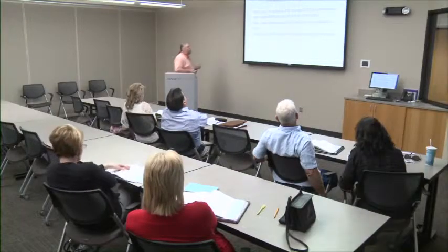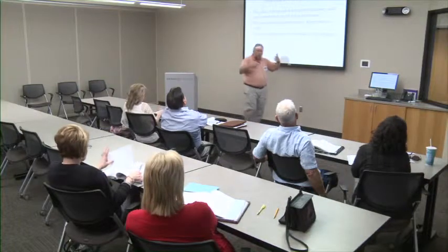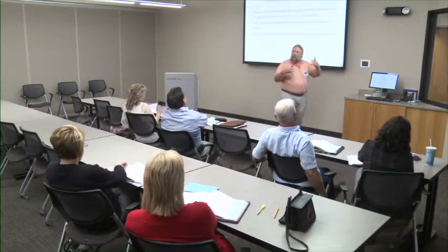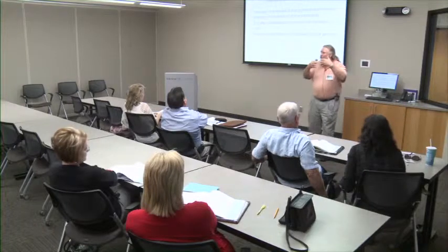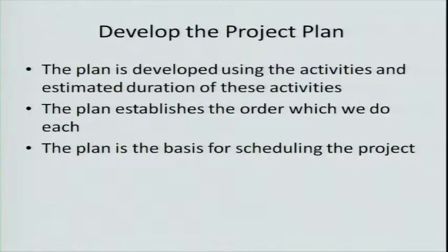Then we develop the plan. Okay? We have an activity, we know what comes before this activity and what comes after this activity, and we can start putting them in sequential order along with the durations. Okay? So now we're getting a time scale going together. We're getting item 1 followed by item 2 followed by item 3, and it's 3 days, 5 days, 7 days. So now we know, gee, we're out 15 days. Okay?